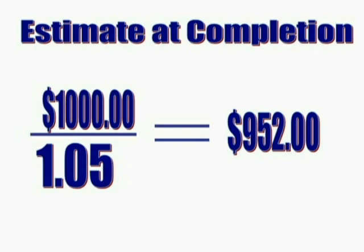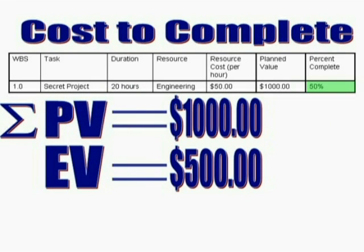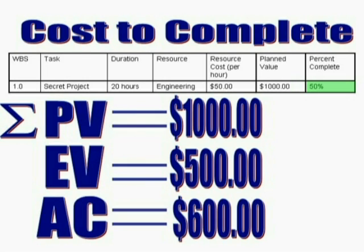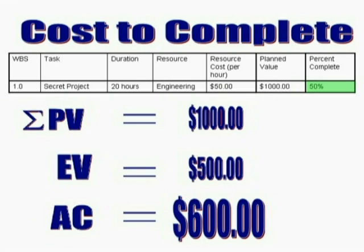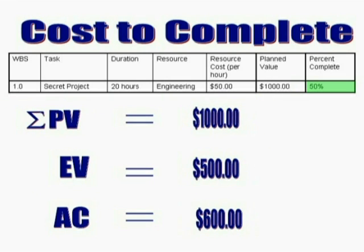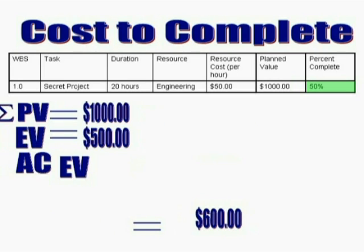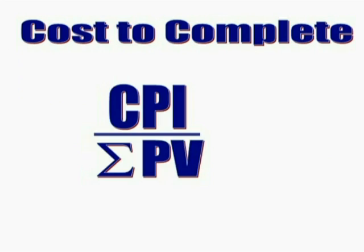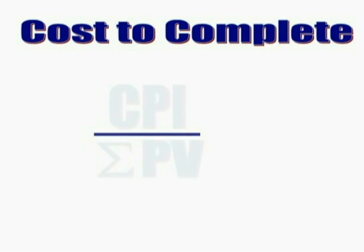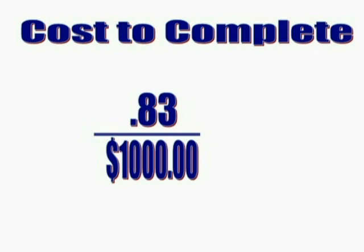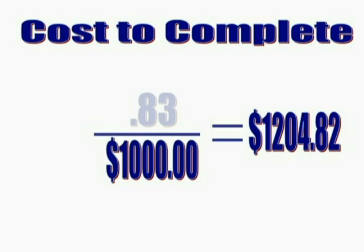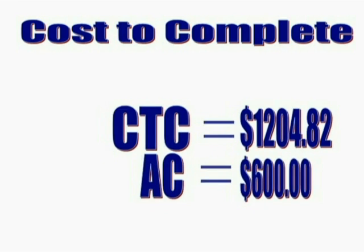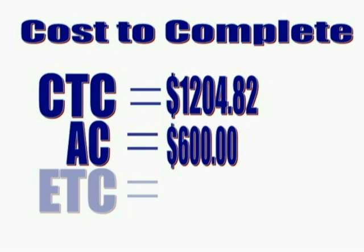Finally, you need to know how much of your reserve to transfer to the project budget, which means you'll need to calculate the cost to complete, or CTC. Look at the percent complete of the project as a whole — in this case, 50% of WBS items are complete. Using our $1,000 budget, we have an earned value of $500. If our actual cost is $600, we have a CPI of 0.83. We calculate our estimated completion using the CPI divided by the budget, or plan value, which equals $1,204. We've already spent $600, so we estimate it will cost $604 to complete the project.